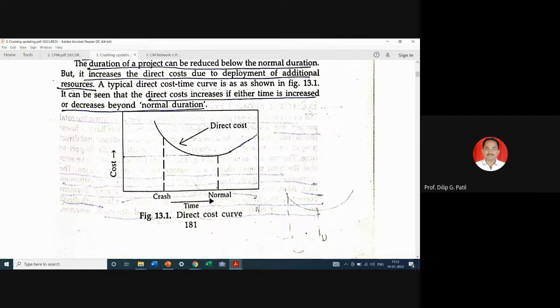पर्टिक्युलरली काही ठिकाणी स्कोप राहील की बाबा एक्सकॅव्हेशन करायचं आहे 100 क्युबिक मीटरचं, तिथे instead of 2 machines you can deploy 4 machines. But again, there will be limited space. There will be minimum space required by each machine.